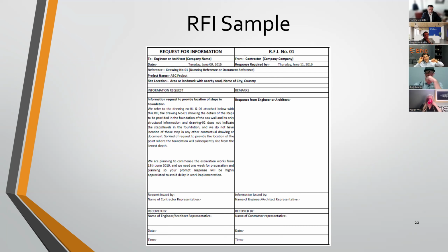Or it could be a material shortage issue. Let's think about during COVID. Let's talk about roofing underlayment. Couldn't find it anywhere. So, we can't go with this product, can't go with slope roofing underlayment because the lead time for that is 180 days or 360 days. I want to go ahead and use product A instead. Are you amenable to that? You can start off as a question, and then, depending on the answer, it's going to have a corresponding submittal, right? So we have it all documented and make sure that we're all good to go.